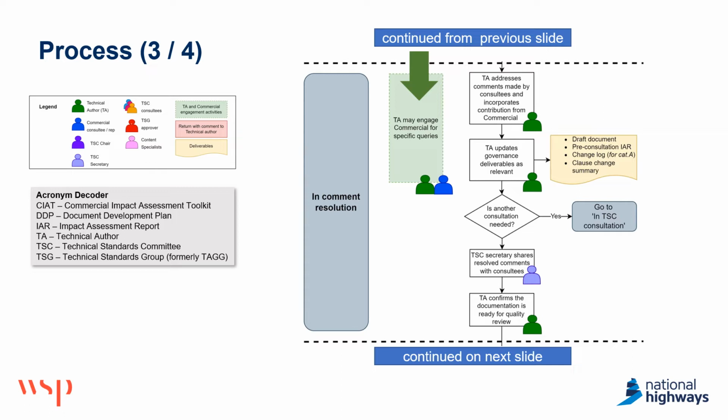Once all comments have been addressed, a decision on whether another consultation is needed shall be made by the technical author and the TSC chair. In any case, comments resolution will be shared with the consultees for information. At the end of this stage, the technical author shall confirm whether the documentation is ready for quality check by content specialists and shall provide all governance deliverables so they can be checked for MDD compliance by content specialists.